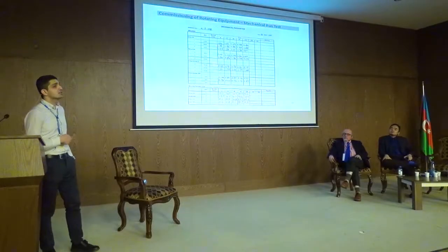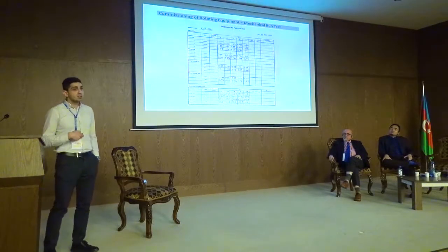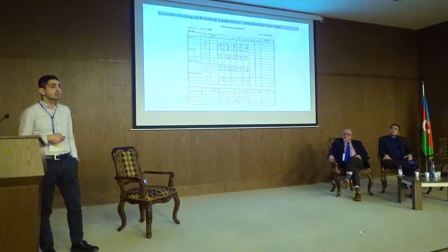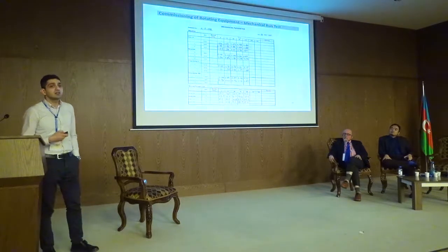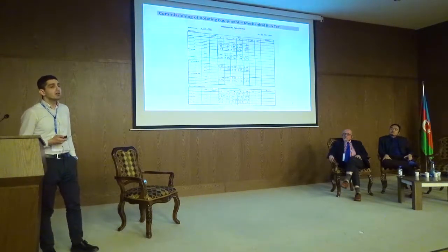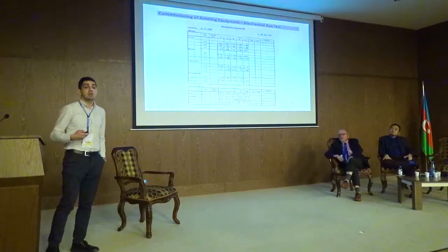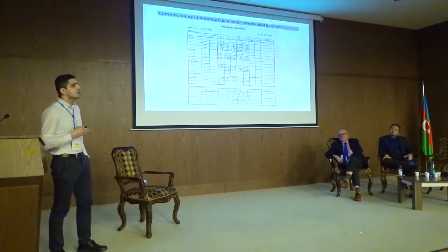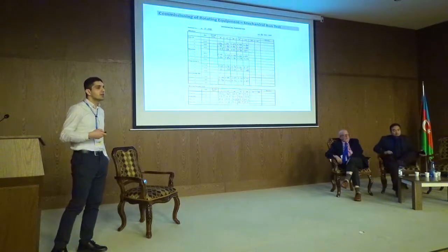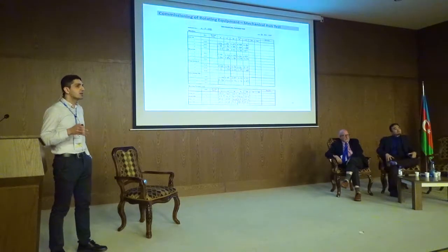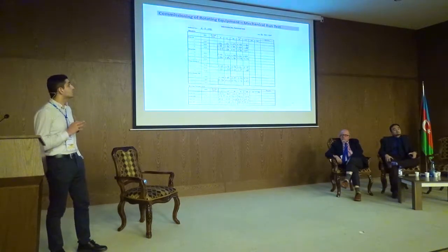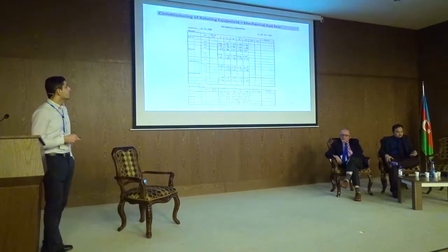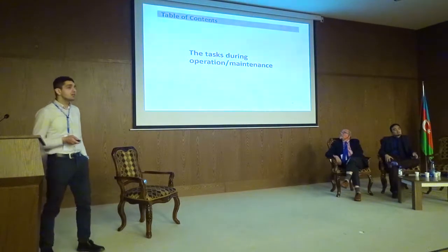These tests are not run under actual operating conditions, because we haven't started up the plant yet. We might not have the proper operating pressure and temperature available to do the performance test. So that's why it's just a basic mechanical run test in order to see that the equipment runs smoothly. Okay, so once we are done with the commissioning, what is the next stage?